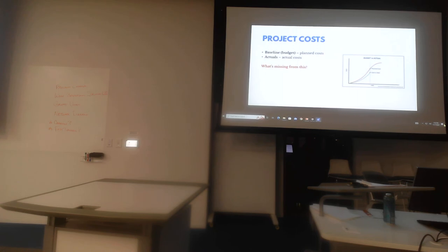Now, if you look at this chart on the right, it's showing you how we're spending on a particular project cost over time. And it looks like, because the red line is our planned cost and the green line is our cost to date, maybe we're actually doing pretty well. Under budget, we have a little bit of room, and so if something does go wrong, we've got some management reserve or contingency. It looks like we're underspending, which in some cases is perfectly fine.